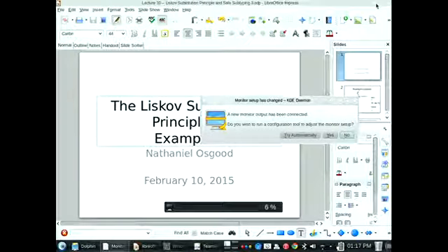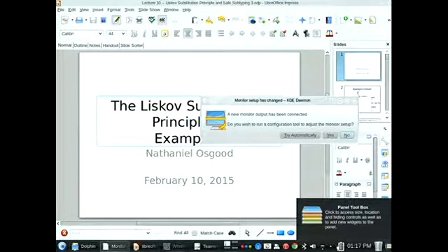Now, is that 20 hours of clock time? How many people do you have in your team? Okay, that's a good question. What's another question? How many of them are dependent on the other? That is an even deeper question. Let's suppose T4 depends directly on T3, depends directly on T2, depends directly on T1, in the sense that it can't be started until the previous one is finished. Can't start T sub I until T sub I minus 1 is finished. What would that imply about the total length? Then it's 20 hours regardless of how many people you have.